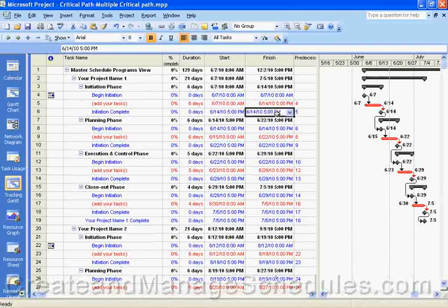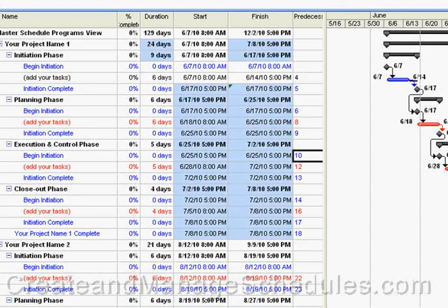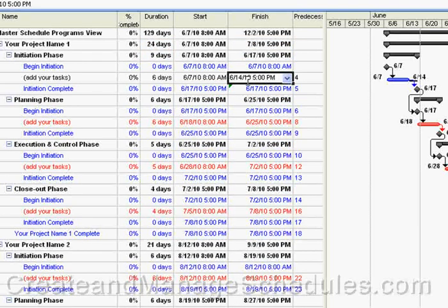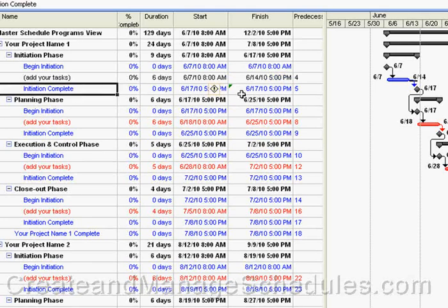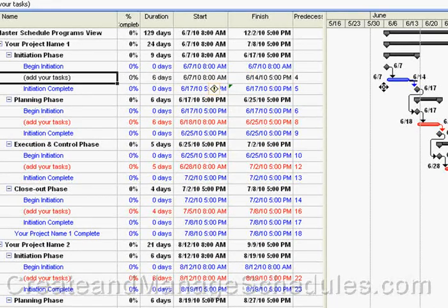this has to be done by the, let's say, 17th, okay, and then I hit save. So I moved it from the 14th to the 17th. So this task right now is scheduled to end on the 14th, but because this section is defined to end on the 17th, and the 14th is a Monday, and the 17th is a Thursday, that means we have 3 days slack. And now this task appears black. There's a little black line here for slack, and it's no longer red. Okay?